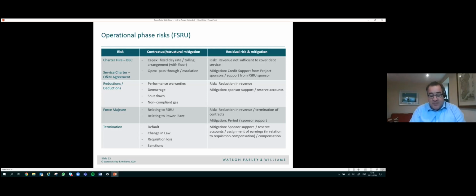Any failure on the part of the FSRU sponsor to obtain any relevant authorization which interrupts the project's use of the unit will result in the FSRU being placed off hire until such time as the authorization has been obtained, and ultimately a right on the part of the project to terminate the charter in the event that such breach is not rectified within the stipulated period of time.